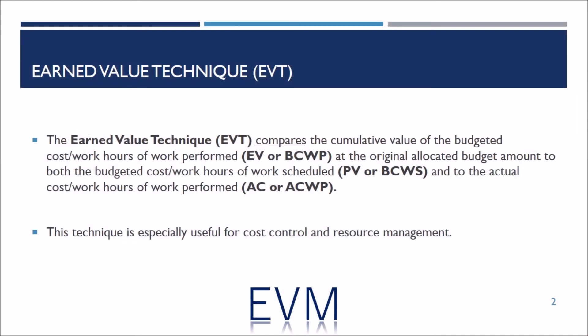What is the Earned Value Technique? The Earned Value Technique compares the cumulative value of the budgeted cost or work hours of work performed at the originally allocated budget amount. This comparison is done to both the budgeted cost or work hours of work scheduled and to the actual cost or work hours of work performed. That is why the Earned Value Technique is very useful for cost control and resource management.